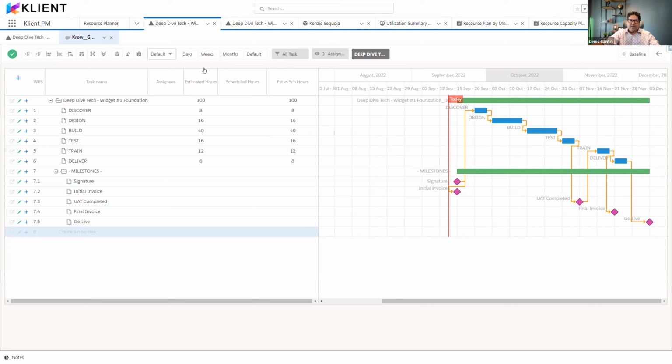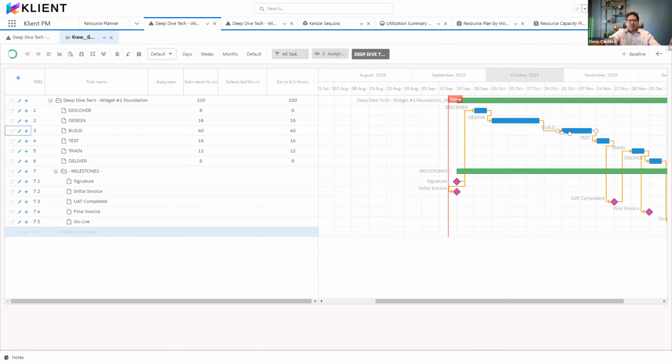Now let's look at the timeline on the right and its relation with the assignment. Because we're doing task level assignment, viewing the timeline is very useful to represent where the effort will happen and how long it should take, plus any relationships. When you use the workspace and adjust the project plan, this will automatically update the resource scheduling when they are assigned. Depending on your company size, there are many ways to do resource planning. Let's do the first option together.